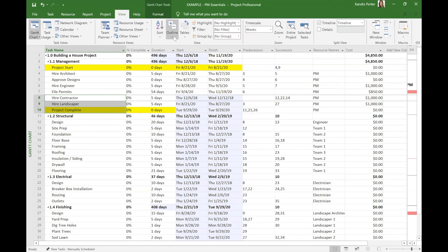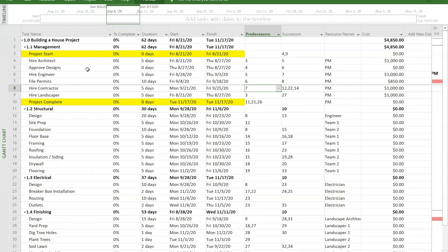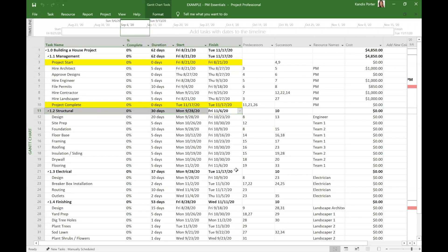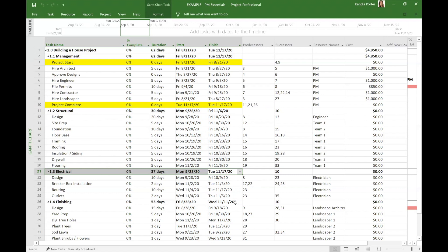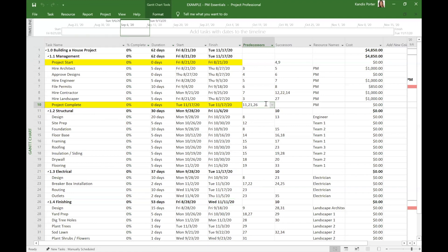You can always go back and cross check your view, making sure everything that's meant to be a certain level shows up correctly. We've talked about milestones — zero duration — and I showed you how I set mine up with a project start date and project complete date. For the project complete milestone, I have the level two work breakdown structure items as predecessors, so as each level two completes, they feed in, and all of those must be completed before the project comes to an end — for example, line 11 structural, 21 electrical, and 26 finishing. Once all of those are completed, they feed in and the project complete date is calculated off of that.